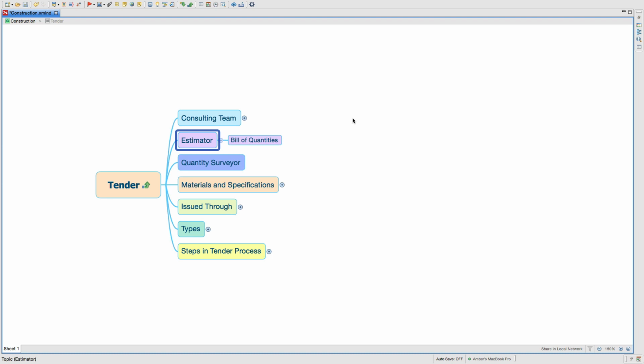Now, this can be done very easily, but I don't have to worry about that portion because we build our own projects, we do our own costing. So even when we do our own costings, we still get an estimation done and we account for that cost, because we want to benchmark against what the estimator says and what our costing says.